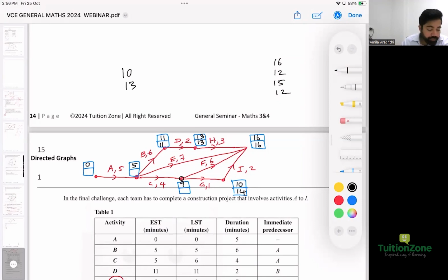So which one do we pick? Fourteen minus 1 is 13. And the other one is 16 minus 6 is 10. So we pick the, was it 10? Yeah, it's 10, isn't it? Tell me if I do any mistake. If I miss anything out, just let me know before I go further. But double check if I do everything right. That's 14 and 9 and then 16. That's fine. Perfect.